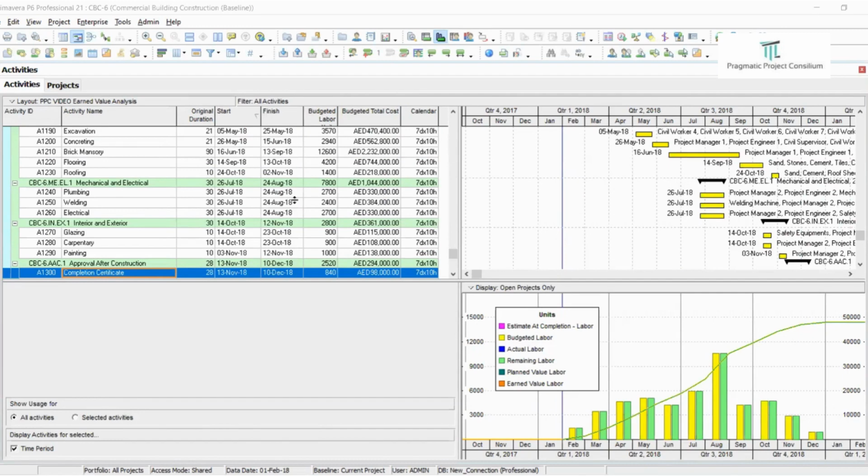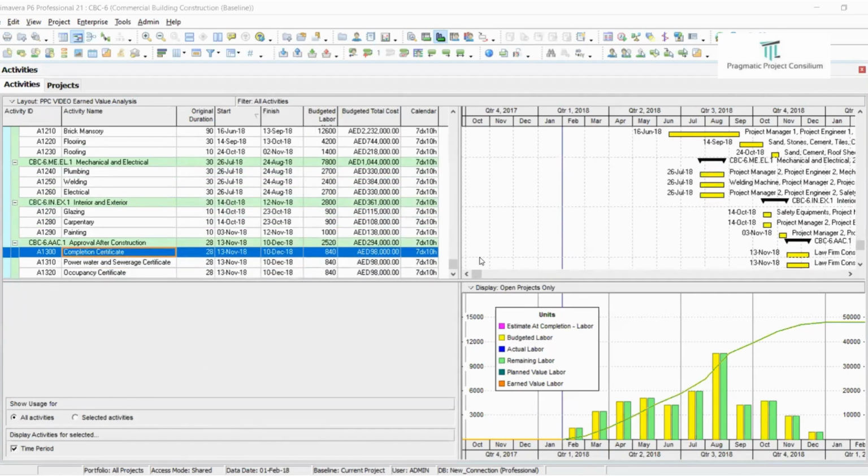Once all the activities are loaded with the resources, as you have seen, resource loading to the individual activities using different resources, and finally once the program is done, we end up with this type of S curve. These are the individual month-level activities, based on the activities for the total month. For example, this is the February value, and this is the March value. The bars are showing both yellow and green, which are actual as well as baseline with the actuals. But we have not done any actuals, and therefore the bars are shown at the same level. So the cumulative curve will also be the S curve. This is how establishing the PMB S curve takes place.